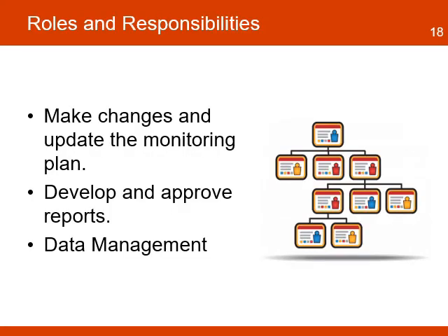This section identifies the roles and responsibilities in the monitoring and evaluation process, including the levels of authorization granted from the organization to the project staff to make changes and update the monitoring plan, the people responsible for developing the reports, and those who will approve the project reports before they are disseminated to a larger audience. The section includes the responsibilities for data management, including data quality, in the monitoring and evaluation process. It is also a good idea to include the roles and responsibilities of partners, key stakeholders, and even beneficiaries.